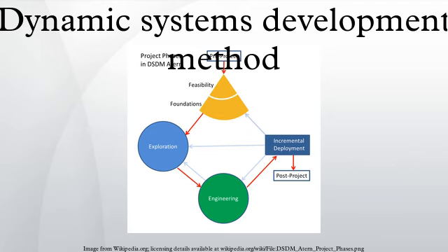The design and build iteration can be subdivided into 4 substages: Identify design prototype, identify functional and non-functional requirements that need to be in the tested system. Agree schedule, agree on how and when to realize these requirements. Create design prototype, create a system that can safely be handed to end users for daily use. Investigate, refine, and consolidate the prototype of the current iteration within the prototyping process are also important in this substage. Review design prototype, check the correctness of the design system. Again, testing and reviewing are the main techniques used, since the test records and user feedbacks are important to generate the user documentation.